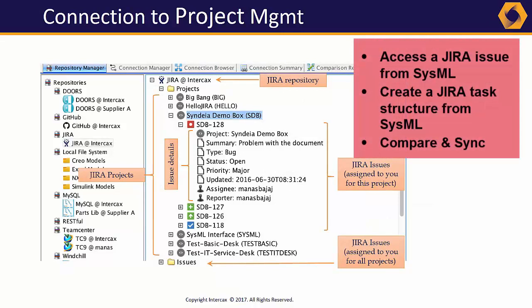A work breakdown structure in SysML can be mapped to a task structure in Jira, tracking status, progress, schedule, and personnel.